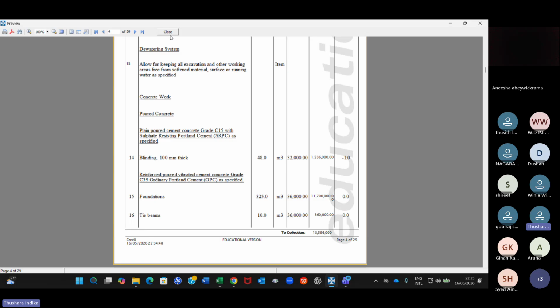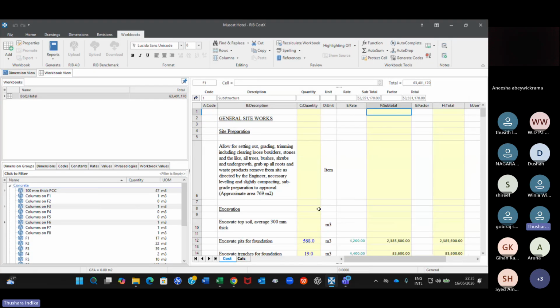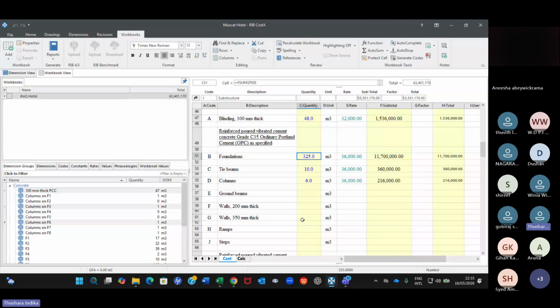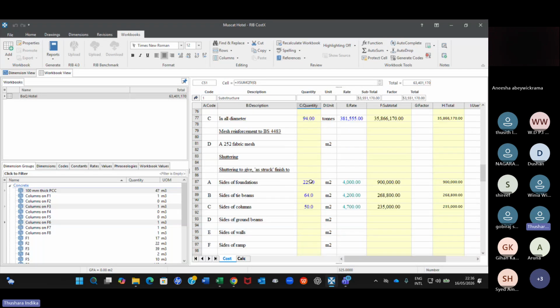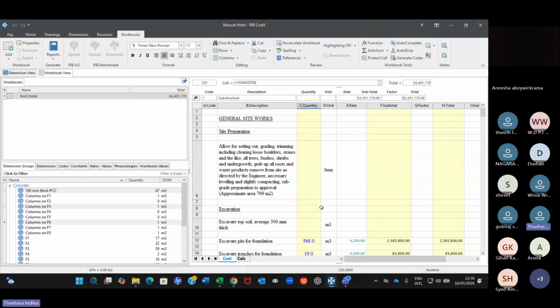I think what has happened was, if you go to this here, we have several layers, right? Earlier, this was I think 333, if I can remember. So everything will be reflected basically, technically, whatever links that we have created with the dimension groups will be automatically updated. So you have to practice this now. You can take a report if you want, original, and what is the variance or whatever, the add and omit also you can see.